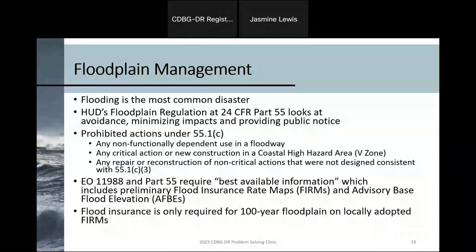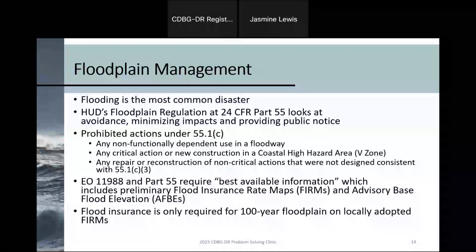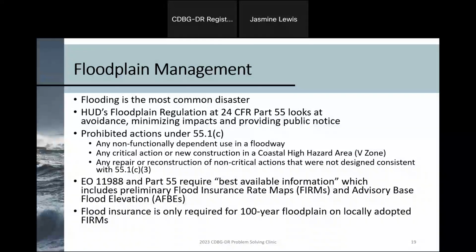One of the things that came up during our sessions yesterday for our one-on-ones is the appropriate size of that local geographical area. Typically, if you have too large an area, there are very few of the laws and authorities that you can actually answer for the broad level review, which creates more work down the road when you're getting to that site-specific tier 2.